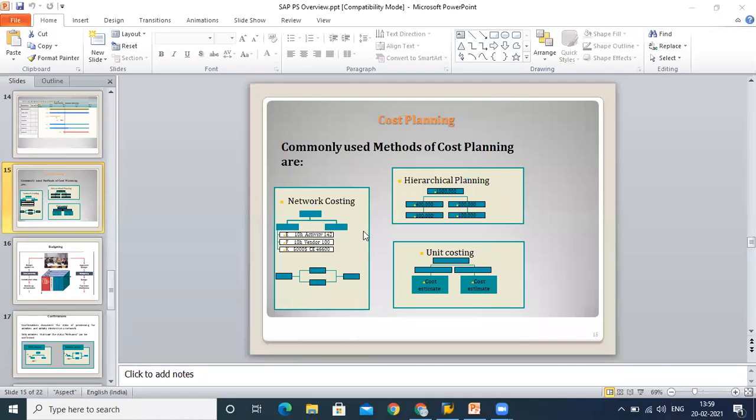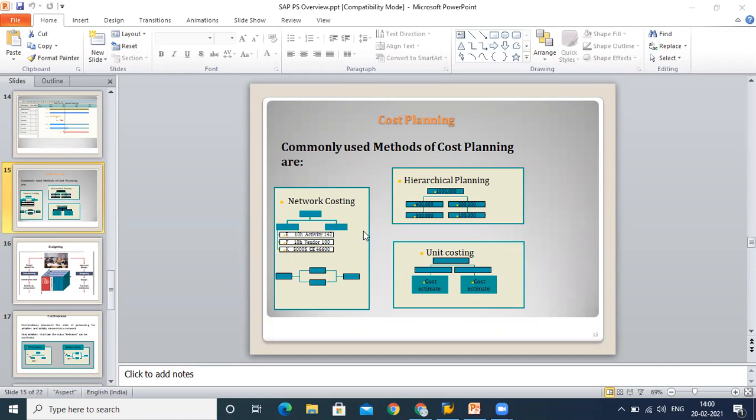As discussed in the last lecture, in this section we will understand cost planning, budgeting, and other areas for project systems. When we talk about cost planning, it is a kind of initial estimate of your cost. On the basis of this initial cost estimate, you will finally prepare your budgeting. Cost planning is one thing, budgeting is another. Cost planning is an initial estimate, and based on this you can freeze your budget.